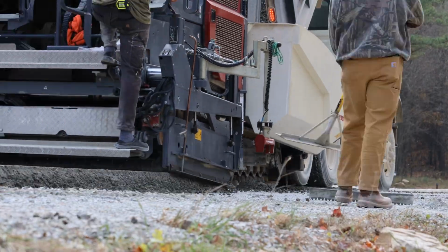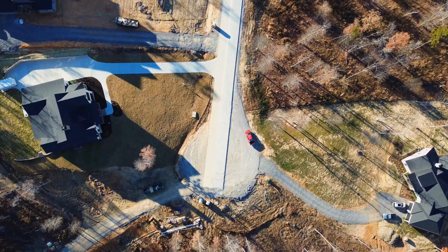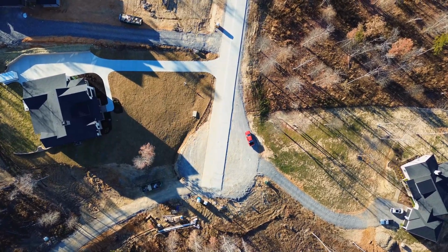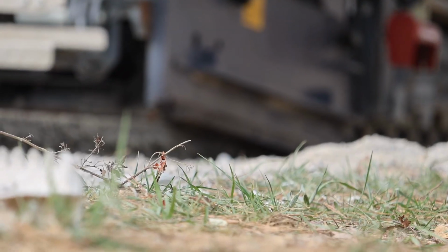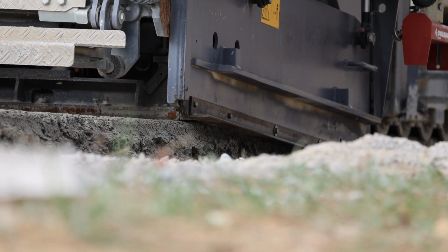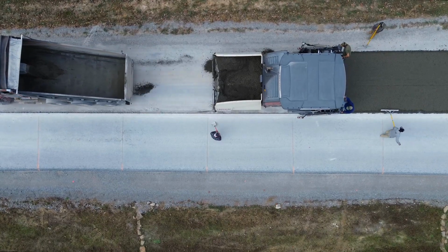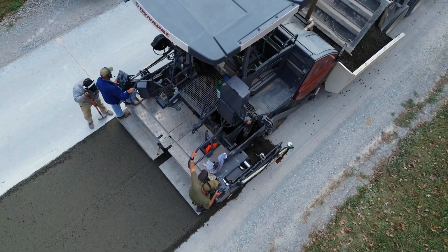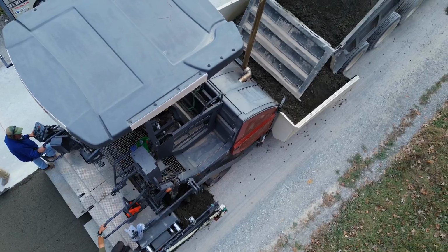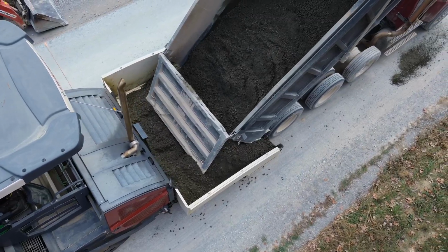The pavement design uses 5 inches of RCC over 6 inches of base material for roadway pavement and 6 inches of RCC in cul-de-sacs to withstand truck U-turns. For this particular project, this system costs only about 15% more than asphalt, yet delivers vastly superior durability and life cycle performance. In general, RCC is slightly cheaper than conventional joint reinforced concrete and very competitive on pricing with asphalt.